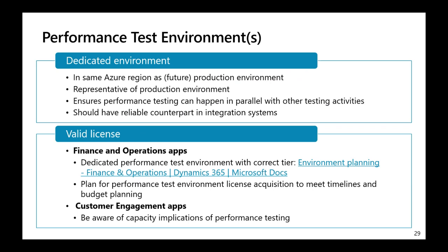And secondly, it's common for performance testing to occur around the same time as user acceptance testing. Performance testing can take quite some time to execute and push the system to its limits, thereby disrupting any other testing activities. So a dedicated performance testing environment ensures that performance testing can happen in parallel with other testing activities.